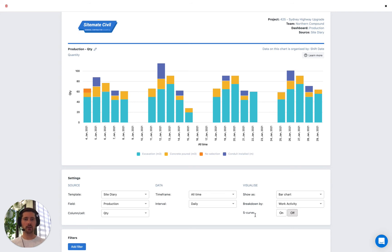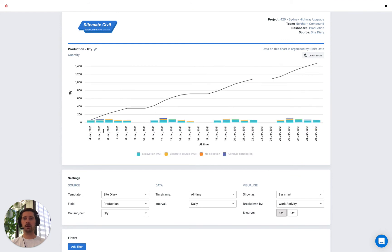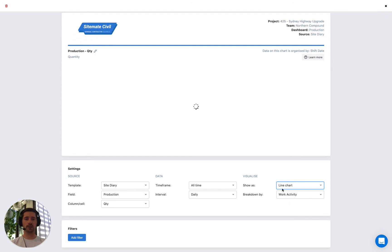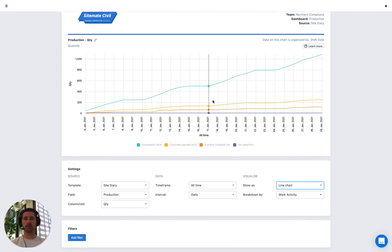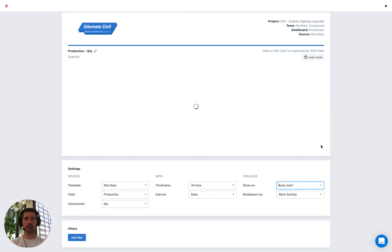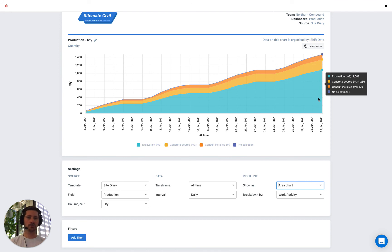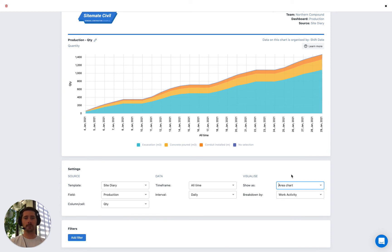It's much more insightful to use the quantity chart than to trawl through your register. The last option is the S-curve: turning that on overlays the cumulative quantity as a line while also showing the bars on the same chart — best of both worlds. The S-curve is only available for the bar chart. With the line chart we don't have the S-curve, but we can see the total quantity for each work activity over time. With the area chart it stacks all values cumulatively over time, which is sometimes useful if you're looking at total labour hours.